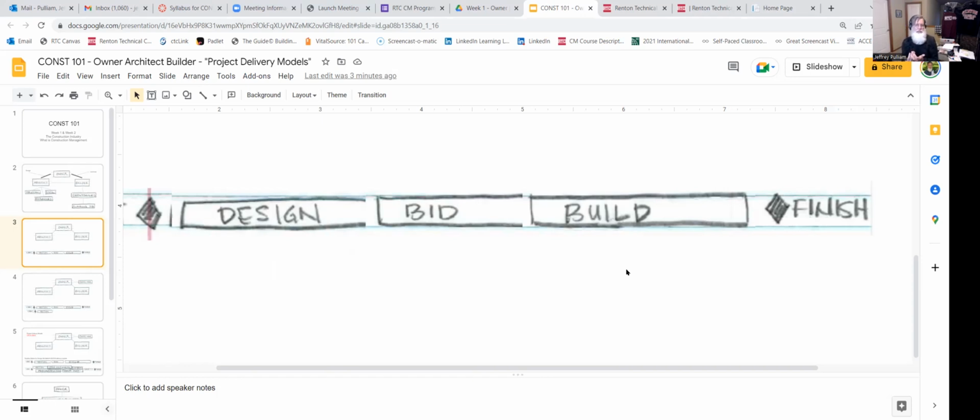Well, the bid piece is a number of builders or general contractors will bid the project. So they'll get the plans and specs from the architect, and in this phase, they'll bid the plans. Bidding is they will put a cost to how much money it will require to build the elementary school. So everyone puts together what we call a competitive bid. Of those contractors, the architect will work with the owner and they will make a selection. Most often they'll select the lowest cost bidder.